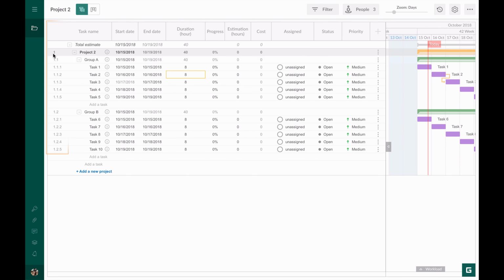The first column is Work Breakdown Structure. Tasks are structured automatically and dependent on your task's hierarchy. We see that the main project goes with the number 1. Two other tasks in this project go with 1.1 and 1.2 respectively. Task 1.2 consists of subtasks with the numbers 1.2.1 and 1.2.2 respectively.